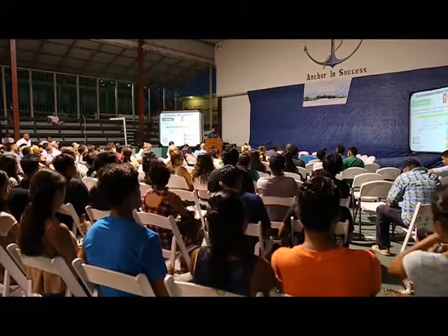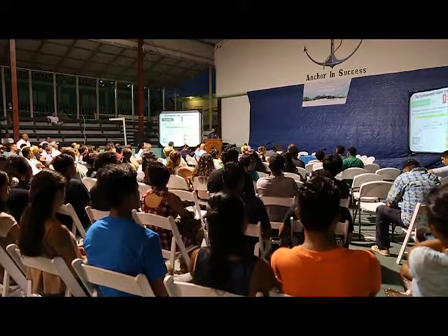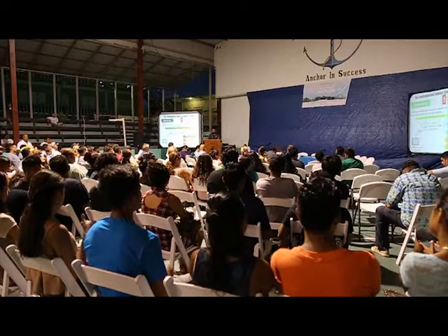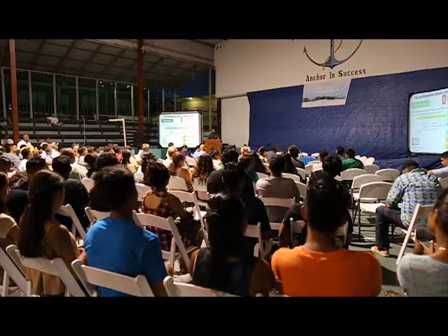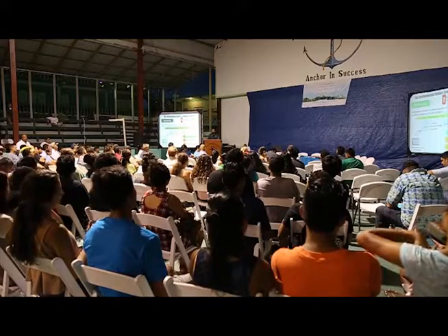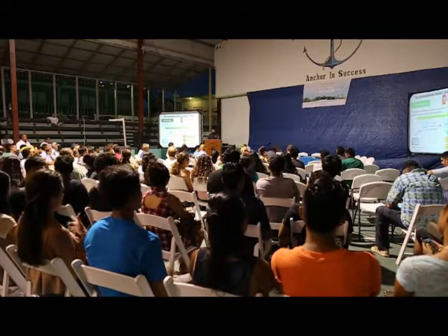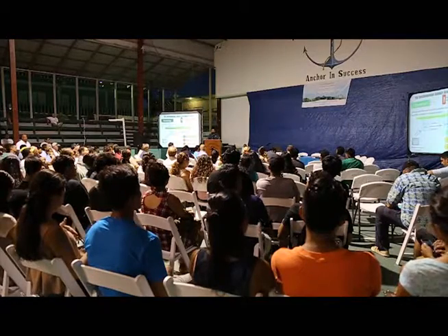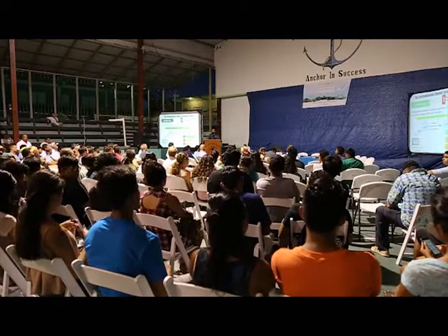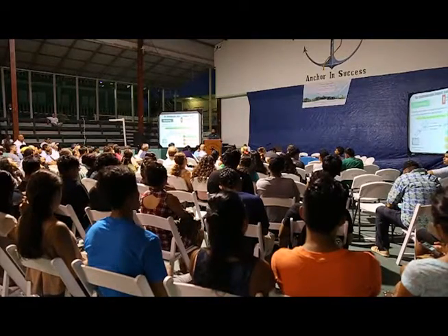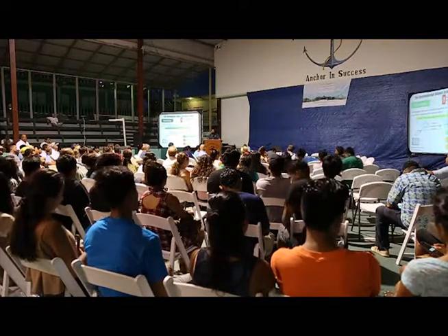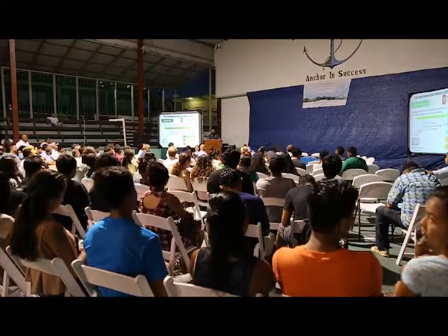Why was this impact assessment required? Because of, one, the location of which this proposed development is being considered in. This is an island development, this is a coastal development. By definition, we consider those as environmentally, ecologically sensitive areas. As well, the size and nature of the project required that the environmental impact assessment process kick in for this development. So the developers were informed of the need to conduct an environmental impact assessment.